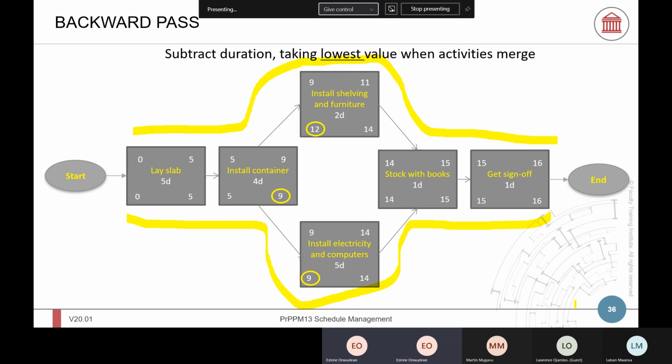So let's start. The duration, add duration, is the variable. We're always going forward, we add duration. When they give the early start, plus the duration gives you the early finish. Do they always give the duration? Yes, all tasks must have duration. In the exam, they give the duration.